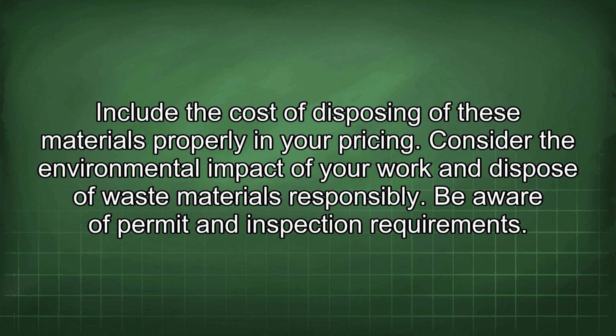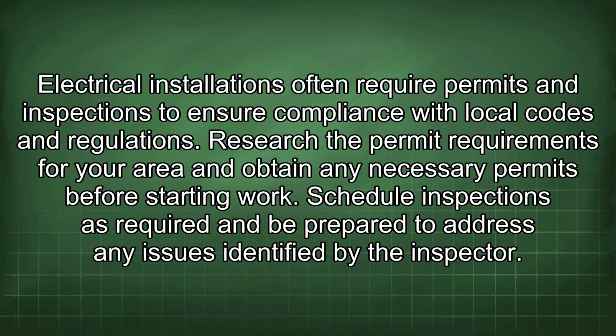Be aware of permit and inspection requirements. Electrical installations often require permits and inspections to ensure compliance with local codes and regulations. Research the permit requirements for your area and obtain any necessary permits before starting work. Schedule inspections as required and be prepared to address any issues identified by the inspector.